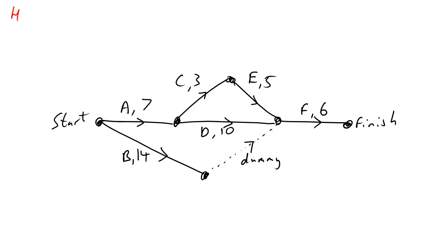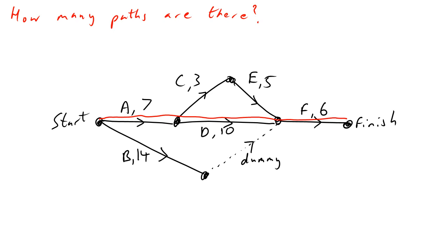So my first question is: how many paths are there in this simple example? Going straight through the middle, A–D–F goes from start to finish — that's one path. Then we go A–C–E–F as a green path, and then a blue path which goes B through the dummy (which we ignore) and then F. So let's add up the totals for these to help us determine which is the critical path — there are three paths: green, red, and blue.